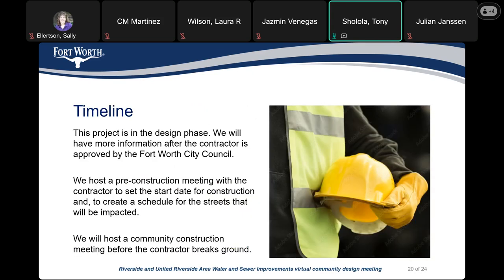The timeline for this project: currently, this project is in the design phase. After design is complete, the project will be advertised for bid. A contractor will be recommended to council for approval. Once all proper documents are in place, we will host a pre-construction meeting with residents and the contractor, where the start date will be announced and schedules will be presented. This community construction meeting will be held with residents and businesses before the contractor breaks ground.